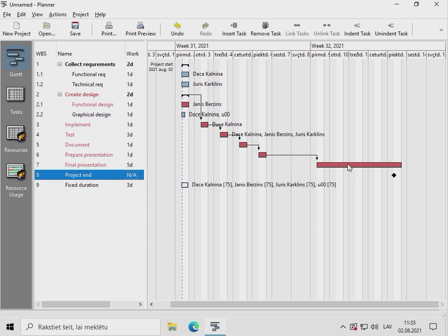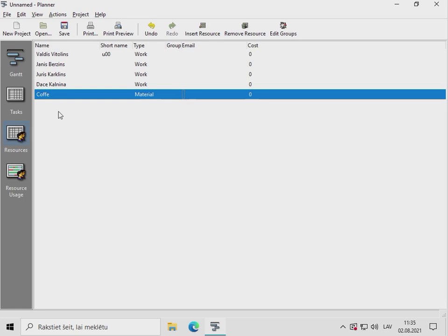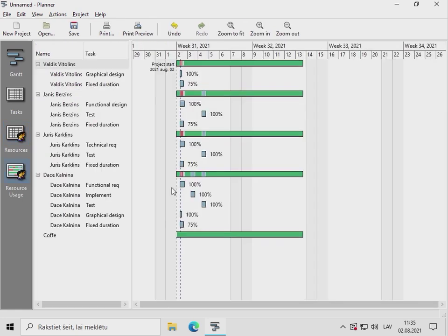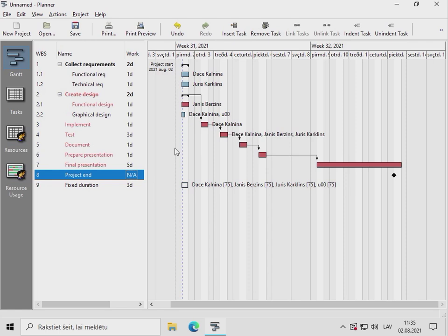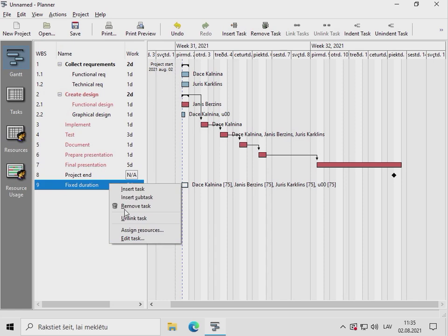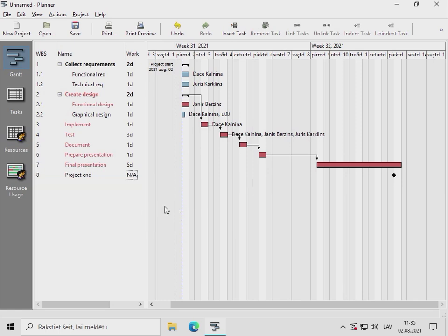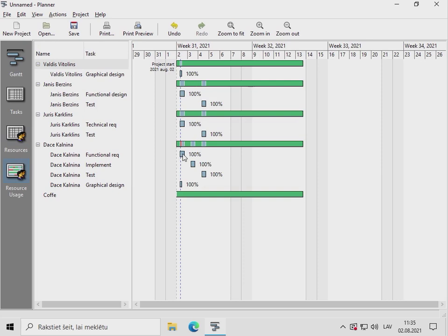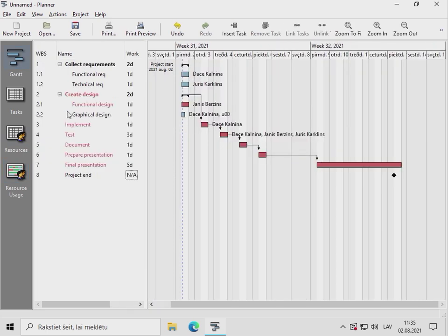So I have covered the entire 2 weeks, but of course my plan didn't get any more details because of that. I just made it artificially longer. And then what will be checked is that you have good resource usage here, but not overusing them. For example, here we can remove this overusing by removing this particular task, and our plan becomes much better.